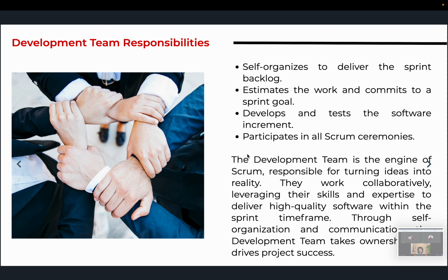Okay, so the development team also develops and tests the software increments. So the manual tester, the front end developer, back end developer, the code review, whatever role you are, you fall into the development team. So you participate in all Scrum ceremonies, with no exception. The daily Scrum is required for you. The sprint planning is required for you. The retrospective and the sprint review, they are all required for you to participate in.